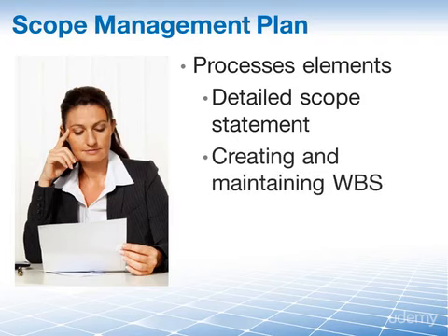It helps us establish a process for creating the WBS from the project scope statement, and it also gives us a process for how the WBS will be approved and maintained. The WBS itself is not part of the plan, but in the plan we describe a process of how we get there.